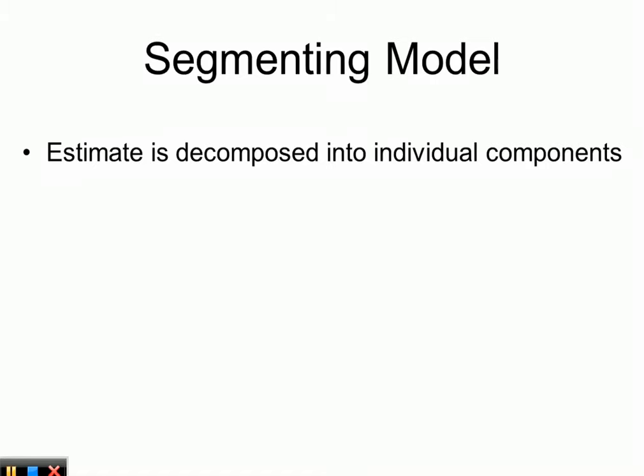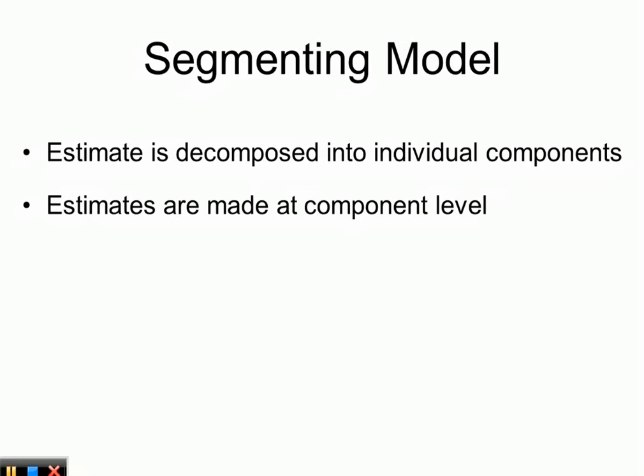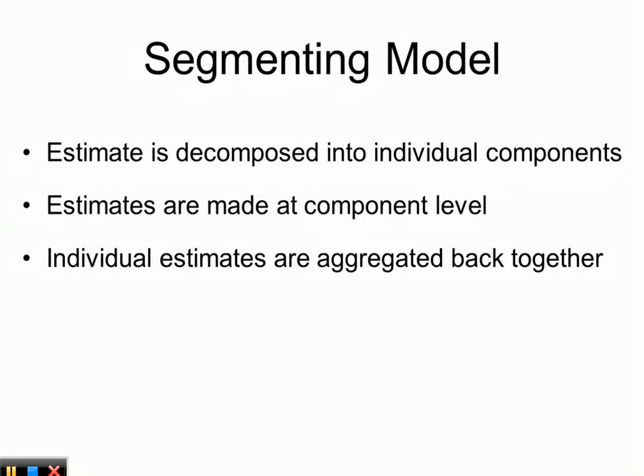The segmented model is used to estimate something that can be decomposed into individual components, for example parts of equipment. If we're building something, we can estimate each part separately and then add them up to a total cost. Estimates are made at the component level and individual estimates are then aggregated — basically summed up — similar to how we summed subtotals in the per-unit model.